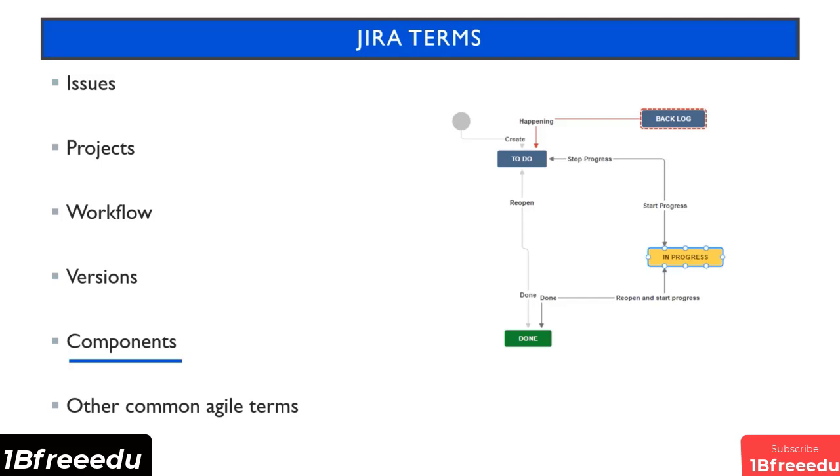And an advantage of having components is that you can configure issues created under a component to have a default assignee, so that when created, it's automatically assigned to that person. So for example, you want all backend dev issues to be assigned to your lead backend developer, who can then delegate it out to other developers. You can do this through component configuration.